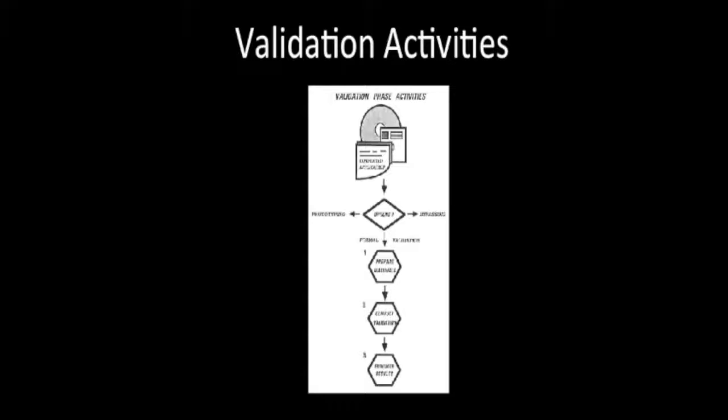The validation phase is the final phase of the Bergman and Moore instructional design model. In this phase, the project is subjected to rigorous testing. It must be determined that the product meets the goals established in the analysis phase. The production teams set up testing environments to prove that the product objectives have been met. The deliverables of this phase include a validation report and a list of product improvements.